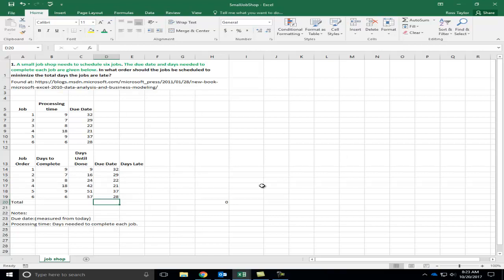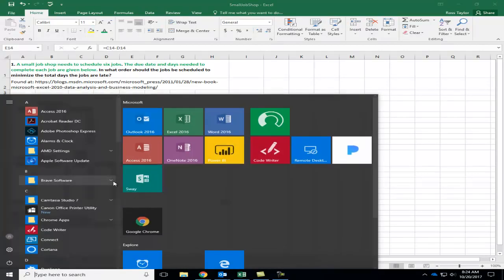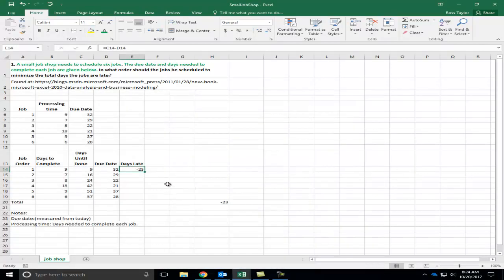Okay? Now, the days late is simply when it's due minus the days until it's done. Okay? So that gives me how many days late this is. Wrong order. Okay. So that's a negative number because we're getting it done ahead of schedule. We don't get credit for getting it done ahead of schedule.